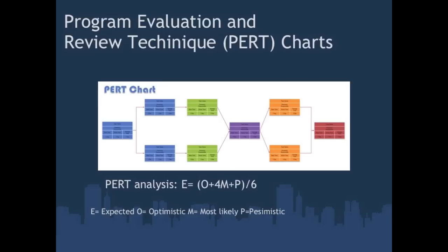The chart can be constructed with a variety of attributes such as earliest and latest start dates for each task, earliest and latest finish dates for each task, and slack time between tasks. A PERT chart can document an entire project or a key phase of a project. The chart allows a team to avoid unrealistic timetables and schedule expectations, to help identify and shorten tasks that are bottlenecks, and to focus attention on the most critical tasks.